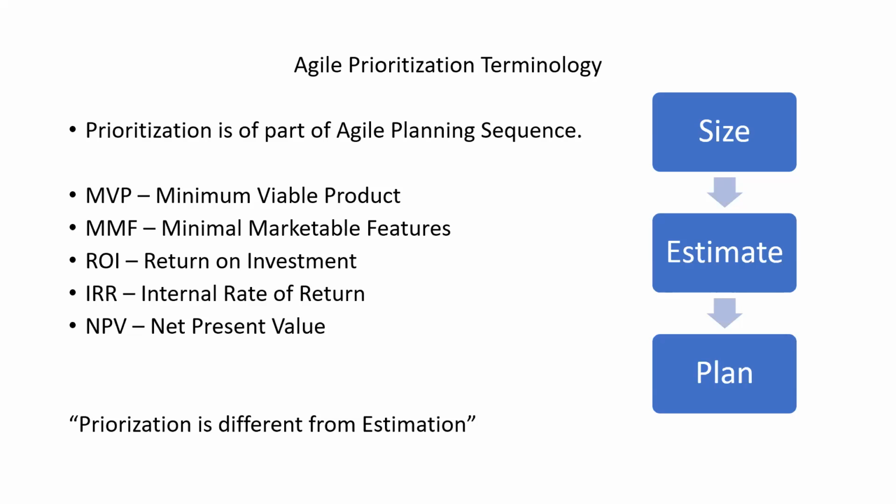Yeah, at the end, prioritization is really very different from estimation. In estimation, you estimate the work. There is one question from Deepika: how is estimation different from priority, with an example? Let's say you have 5 high priority items. You estimate how much effort each priority item takes. That is estimation. You estimate in story points in Agile.